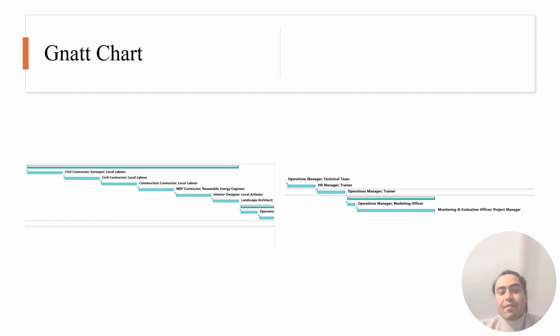In slide 4, I am talking about the Gantt chart, the timeline and dependencies. On this slide, I will show the Gantt chart from Microsoft Project. The bars make it easier to see the project timeline and the dependencies between phases. The schedule runs from the start of the feasibility study through the end of the first monitoring period. Key dependencies are built in so that, for example, detailed design cannot start until the stakeholder consultation is completed.